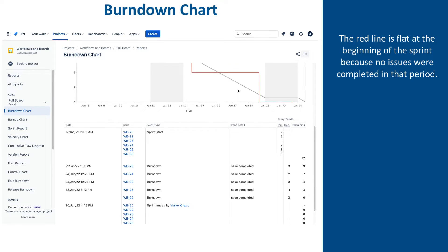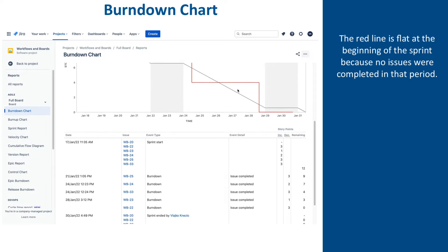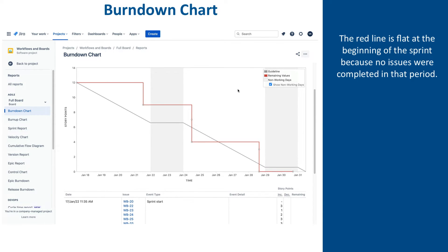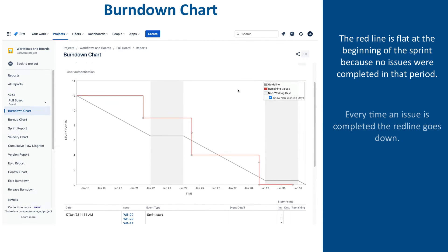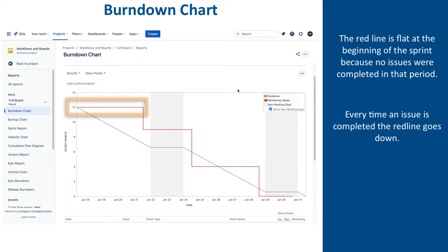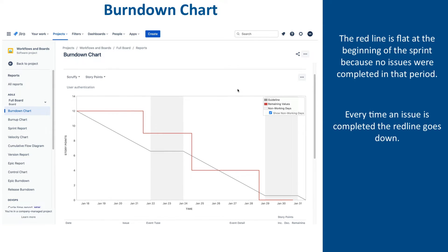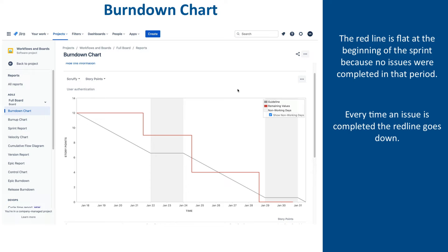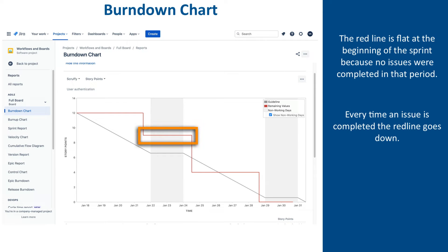In the sprint progress lesson, we did a lot of movements of issues across different statuses before we actually completed the sprint. Let's review how that got reflected in the burndown chart. For the most part of the first week, developers were working on a couple of stories, but the red line remained flat. Then here, the line went down as WB-25 was completed. After that, the weekend kicked in, no work was done, and the red line remained flat.